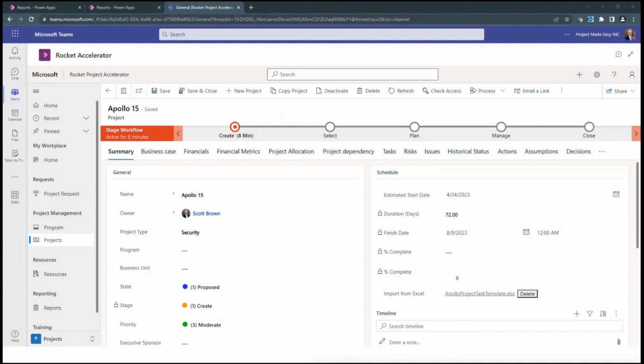If you're familiar with the more enterprise tool, Project Online, it's by permission, by project. A little bit different story there. And then the dashboard, does it update? No, the dashboard is coming from the source data. You need to update the source data to get your dashboard to update.